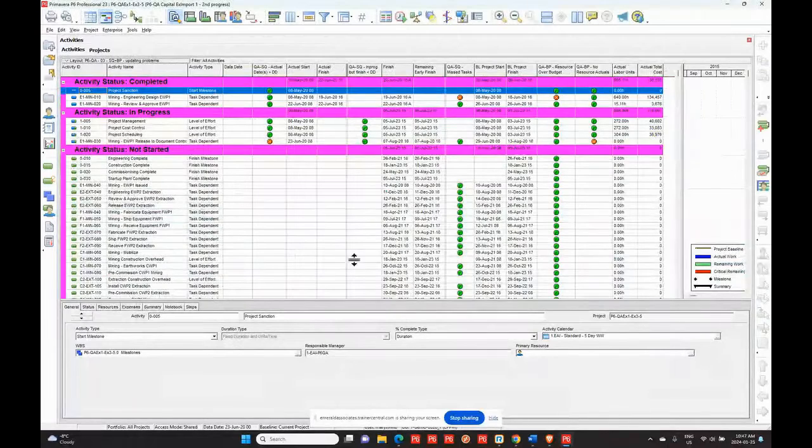And you can see, just a food for thought, some of the things that it's checking. Actual dates greater than the data date. This is actually a filter that for years and years I ran after every update on schedules, because this nice tool that will go in and check it for you and give it to you right on your P6 screen wasn't available. It hadn't been created yet. So now this tool will do this for you.